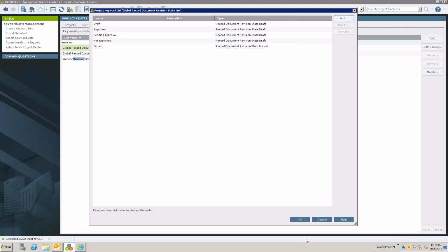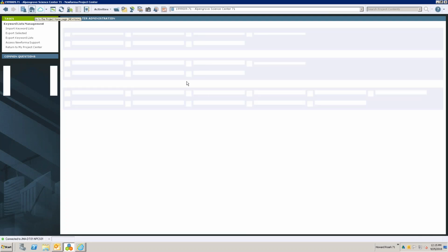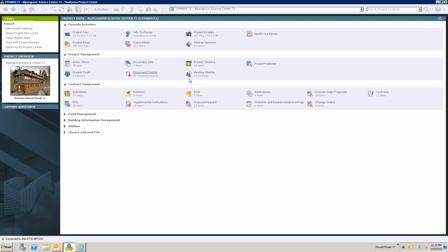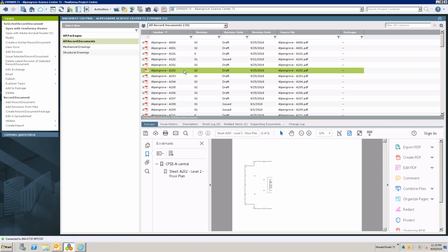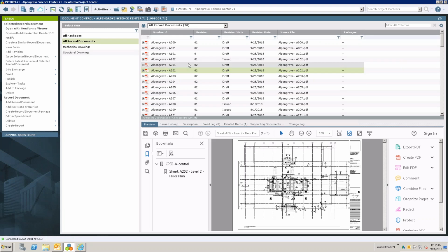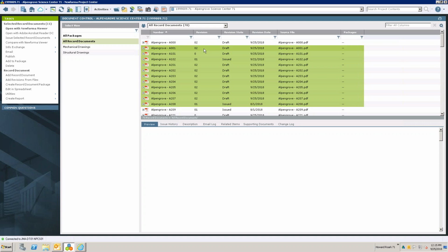Let's see, pending approval. Lori, I may get to issue the same revision 2 times, one as a PDF file and one as a CAD file. Right, so you would want them to be different revision numbers so that you would know which one you're issuing. Because when I have them highlighted, it just revs up, but you could put a suffix on it and say 02 CAD for the CAD revision and 02 PDF. And then that way you could keep them both as draft, I think.